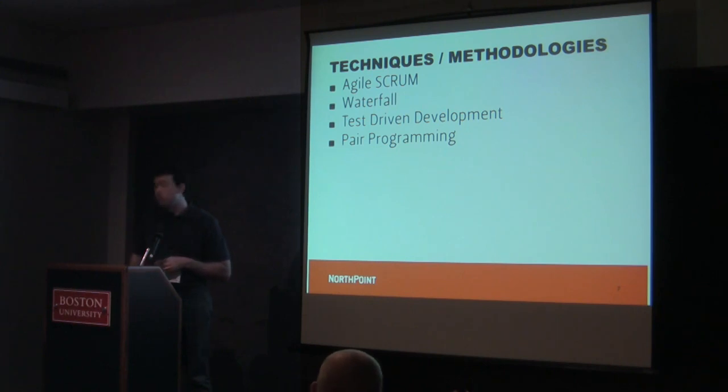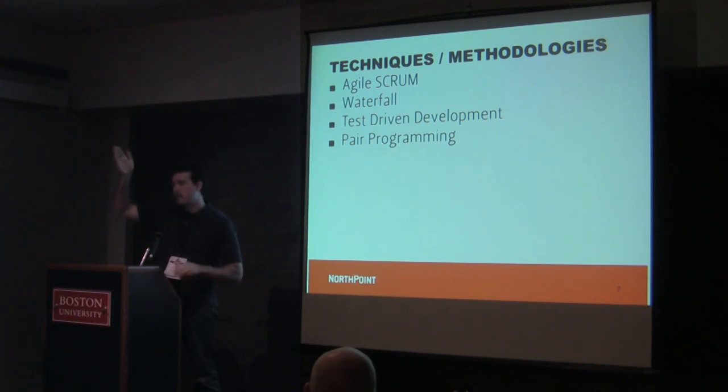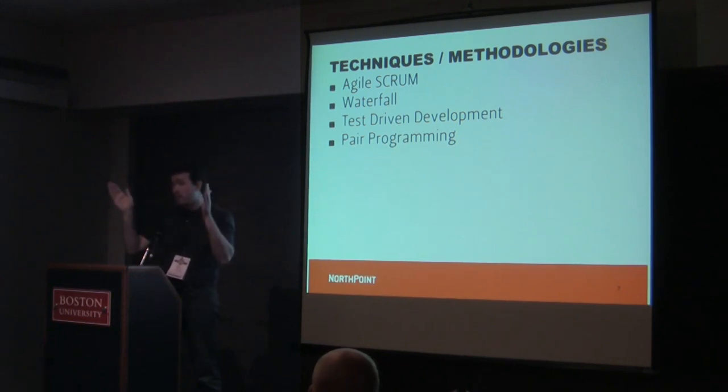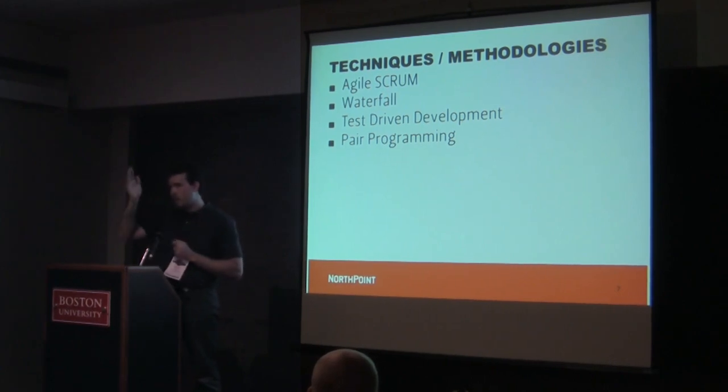Can you explain waterfall one more time? Yes. So visually, it sounds like what it is. It's a waterfall. So what has to happen is everything has to be complete, and then it comes down to another phase in the project. So first phase, you have to do your requirements gathering. So you get all your requirements, and then you can't start the UI or wireframing until all your requirements are done in totally traditional waterfall.